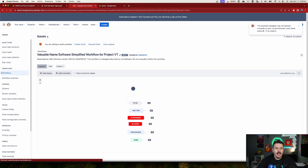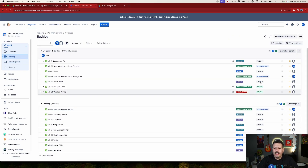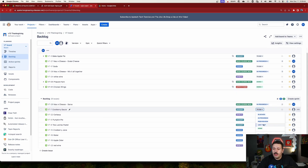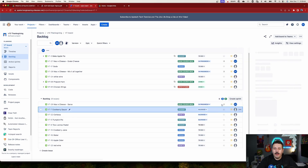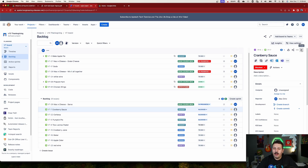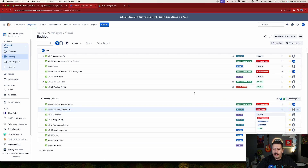Back in your project's backlog view, change some issues to 'Blocked' and they'll turn red. It takes a moment to take effect, but once it does, the red status is very visible both in the issue detail and across the board. This draws the team's attention immediately — red signals urgency. You can use calm colors when things are going well and bright, bold colors for statuses that need hands-on attention, so issues surface without having to go searching for them.